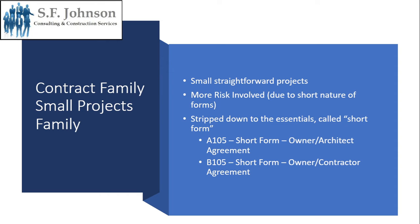Another family of documents is for small projects. Just like any detailed set of plans, the more detailed the set, the more information you have. For small projects, these are bare-bone contracts — small, straightforward contracts for small, straightforward projects. They involve more risk because there's less wording and less detail, stripped down to the essentials. There are two forms called the short form: A105 is the short form for the owner-architect agreement, and B105 is the short form for the owner-contractor agreement. Those make up the small family.